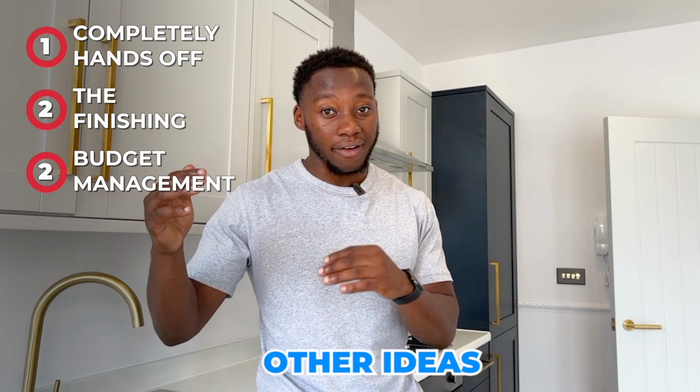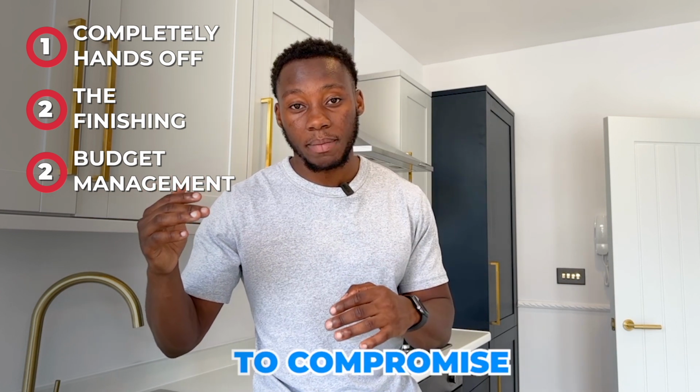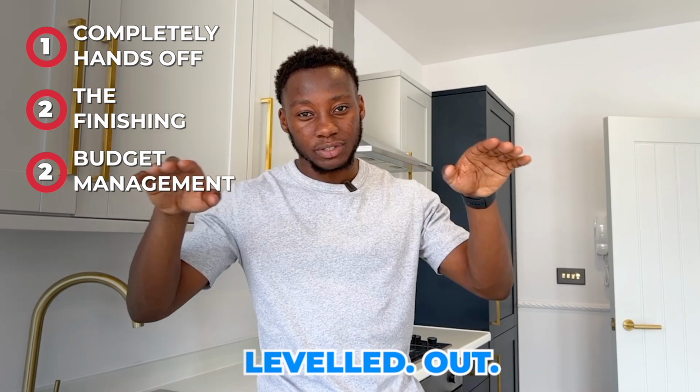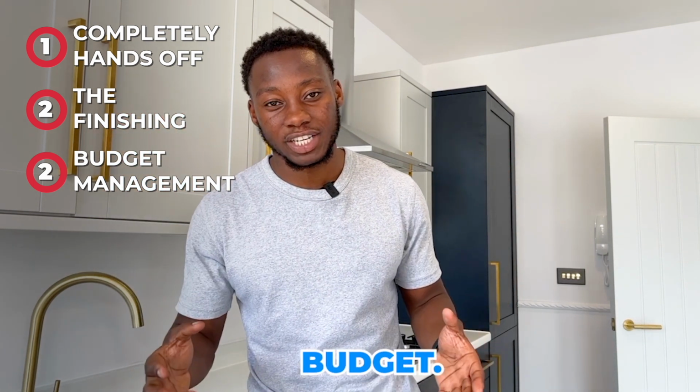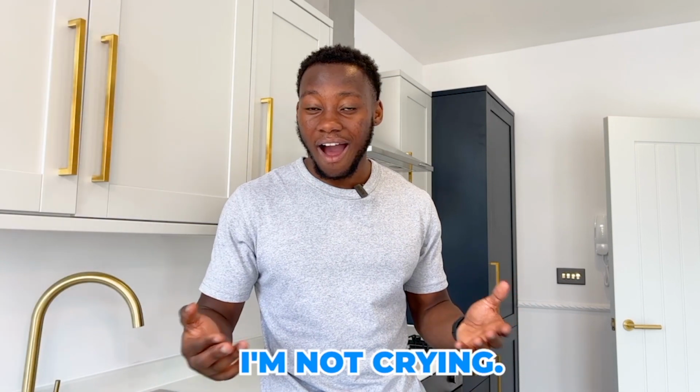And during this refurb as well, we were able to manage the budget in ways where, when costs were rising in some areas and I had other ideas, I knew I needed to compromise to ensure that the budget kind of levelled out and we didn't go too overboard with our £30,000 budget. So 10% over, I'm not crying, I'm quite happy with, because obviously that contingency would have been accounted for. So essentially maintaining within the whole budget and contingency, I'm definitely happy. And that is something that definitely did go well.